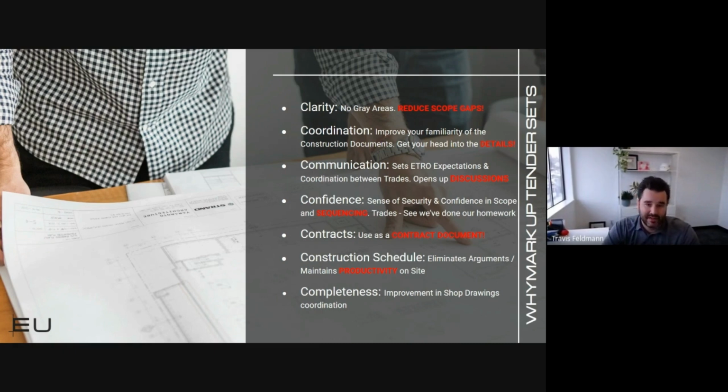So it improves things like shop drawings later on down the road, because you can refer to it again as your contract document and be like, look, it was scoped out this way. You guys do have this unique flashing transition, and it was discussed and hopefully coordinated that way. So then that way the trade tying into that scope also understands that the trade previous to them is including for that unique piece or instance.